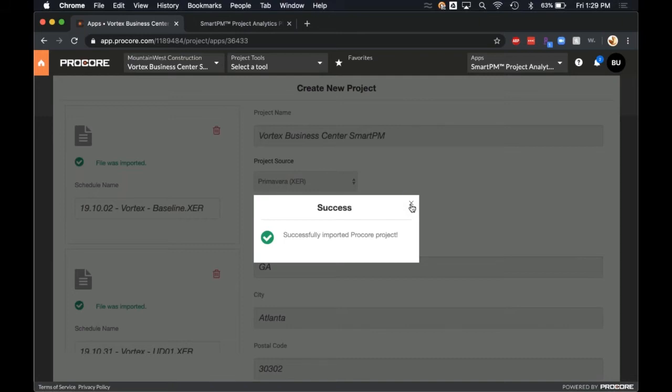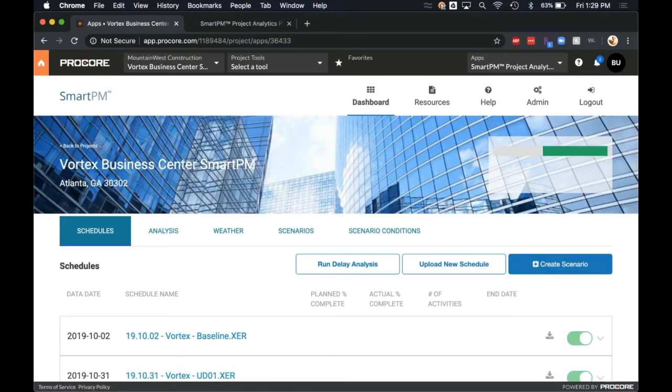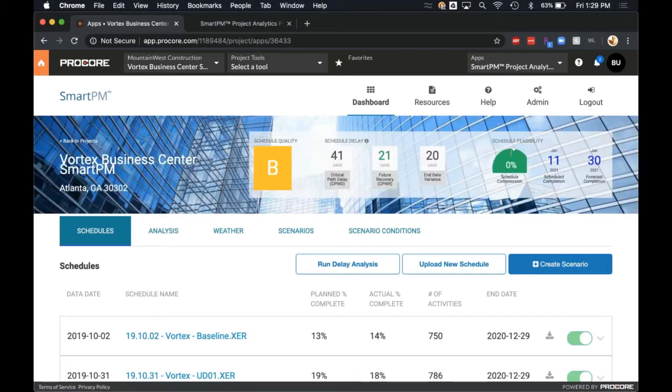So all that information is accessible, and we can build out a full weather analysis for you, saying that given your different contractual terms in terms of how much rain is considered no work, or what temperatures you can work in, we can tell you on average for the last 5, 10, 15, however many years it is in your contract, what should be your weather days.